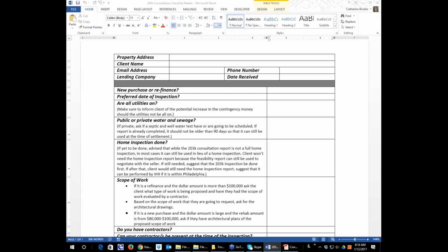A 20% contingency, which may be the requirement that you might place on the project if no utilities are on and testable, is what I recommend. If no utilities are on, I would recommend you automatically roll up to the highest contingency to protect the condition of the project after closing. So with that being the case, that's an additional $2,000 that would be added onto this project for the total of $8,000 in contingency. So let's think about it.